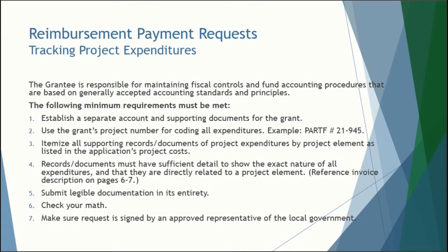Reimbursement requests can be submitted as often as quarterly with a minimum of $2,500 of expenditures incurred. Planning is capped at 20% or $200,000 of the project cost, whichever is less. Now, on to the bulk of this video. Let's walk through a reimbursement request.